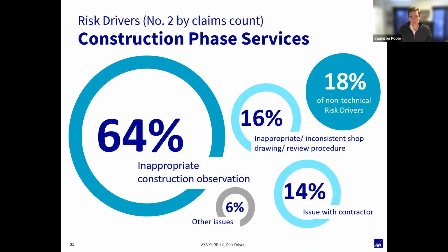The other area with construction phase, and I think, Catherine, you touched on it earlier, is that sometimes clients will try to trim the construction phase or cut you off from the construction phase services. In those cases, I have some sample language that we use. You should always send them a release that says, you are cutting off our construction phase services, you need to release us from any and all liability stemming from that. If things are built incorrectly and we're not out there to check it, you can't come back to us. Sometimes the effect is they say, oh, okay, maybe we'll get you out there for CA. But if nothing else, we have that release if something does go wrong.